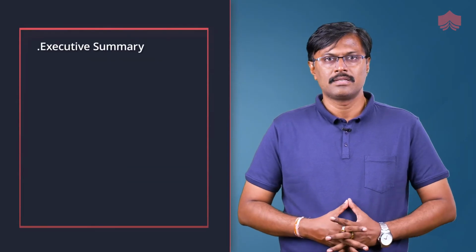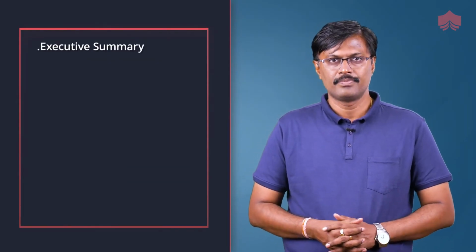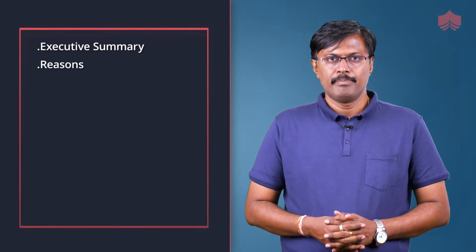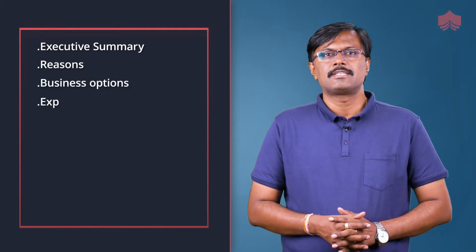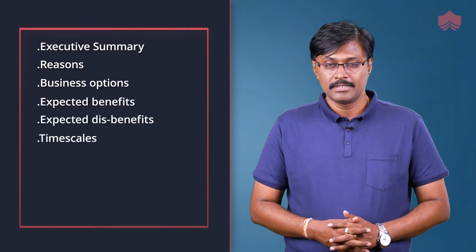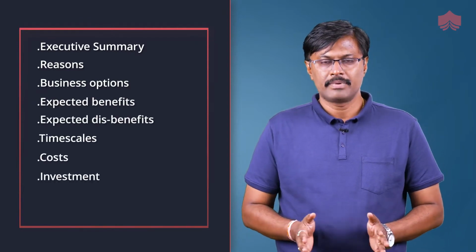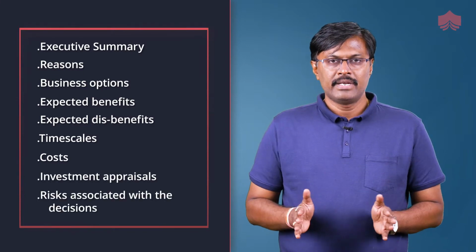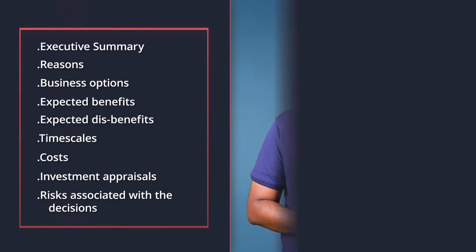Every business case should capture an executive summary related to the case considered, based on the scenarios, the reasons for taking up that particular project, business options, expected benefits, expected disbenefits, timescales, costs, investment appraisal, risks associated with the decision, recommendations and conclusion.